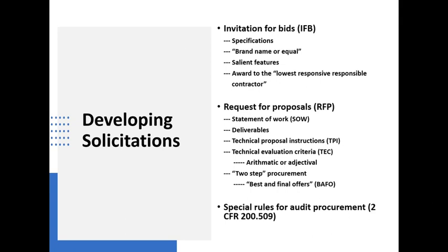What you then do is you solicit the best and final offer from the 5 who are capable. And it doesn't matter what their score was on the original step. They're all considered equal at the point where you're now asking for, give us your price. And then you select based upon the low price among the qualified parties.